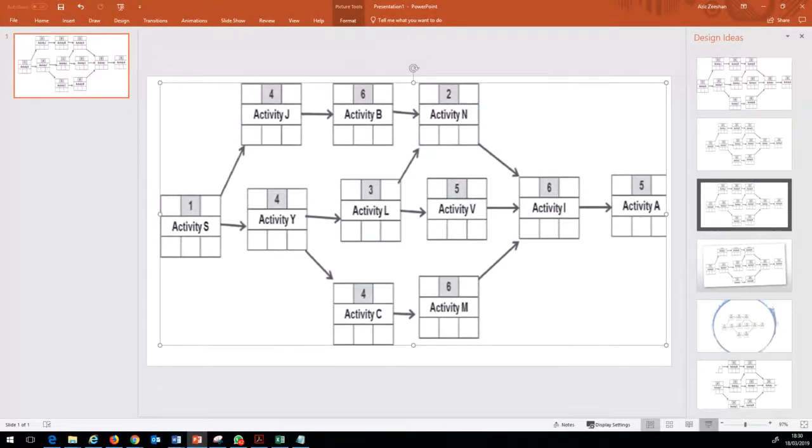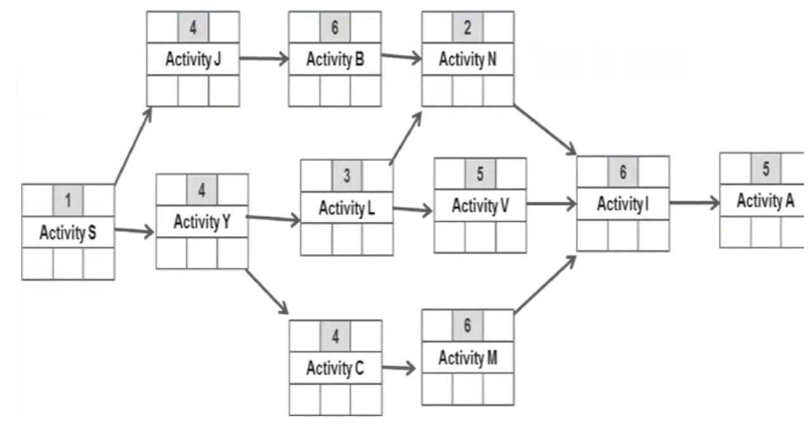So when we are faced with a project which is constrained, we use and begin the scheduling from the constraint point. So here the key constraint which has been given is that this project must be completed in a 40 days duration. There is no two views about it, and there is no flexibility which is being shown. So we know that the late finish time for this project is 40.